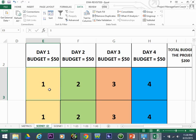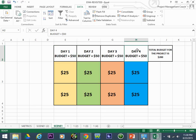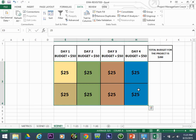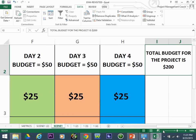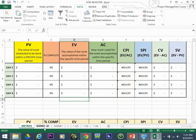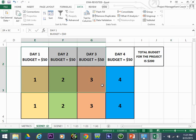We're promising we'll get it done in one day for a budget of fifty dollars, broken down into two panels at twenty-five dollars each — hence the total budget of fifty. Days two, three, and four have the same budget of fifty dollars each. At the end of four days, all panels will be complete for a total budget of two hundred dollars — that's the Budget at Completion, or BAC.